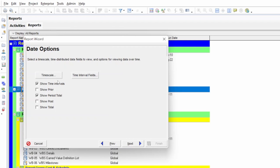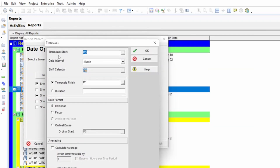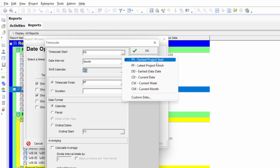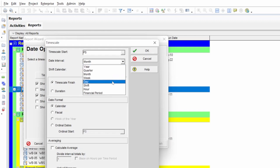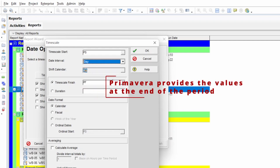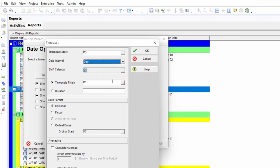Then click Next and select the timescale. In the timescale settings, you can specify a start date, or for a baseline program, use the Project Start date — select 'PS' (Earliest Project Start) from the dropdown. For the date interval, if you are making a monthly progress curve select Monthly; for weekly select Weekly. I recommend selecting 'Day' because it is the minimum option and most flexible — from daily values you can derive weekly and monthly percentages.